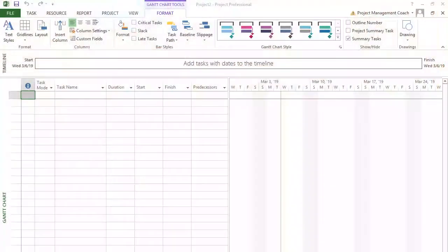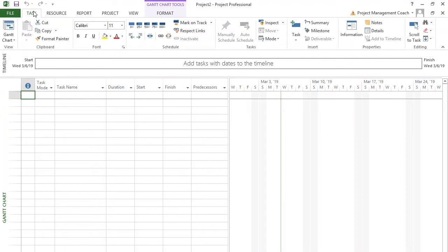Microsoft Project. So here we go. And you can take a look at the screen here. You can see the Microsoft Project interface, which many of you are used to. But I just wanted to underscore what exactly is happening as you walk through the scheduling domain. As you walk through scheduling, you need to think about what you do in real world terms. So plan schedule management will be planning how to develop the schedule, the software to use, who's going to give you the duration estimate, who's going to help you to sequence the activities and give you the logic, the sequencing logic, and so on. That stuff needs to be talked about up front.